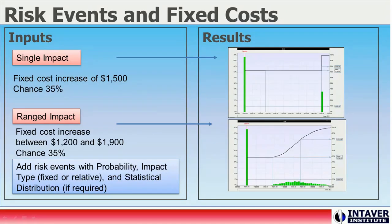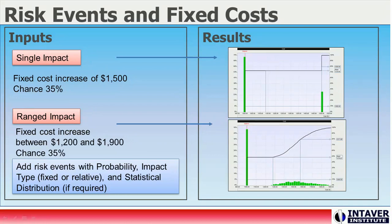Risk events are risks found in the risk register. They have a probability of occurring and an impact. Probabilities are between 0 and 100%. Impacts can be fixed or relative — a percentage of the base cost — and can be a discrete value or modeled as an uncertainty with a range of values defined by a statistical distribution. In the first example with a discrete impact, the risk appears as a single bar in the histogram. In the second example with a ranged impact, the risk appears as a small distribution to the right of the base estimate. As we can see, the way we choose to model the risk can have a significant impact on the results.